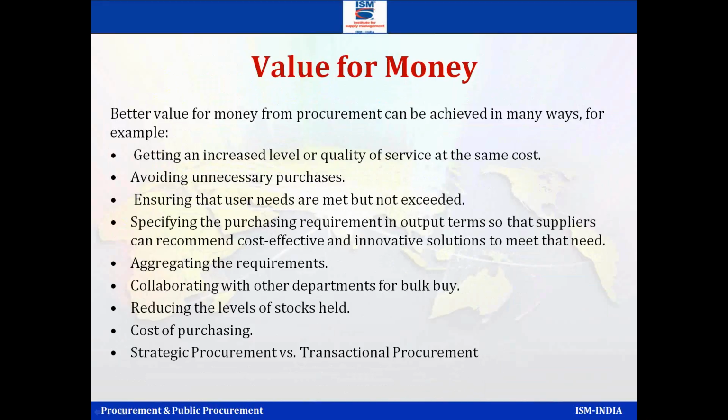But strategic is different. In the US, strategic has been a must from the year 2005. There was even a president's circular on that. Strategic means you try to see what we bought last year, and how much my volume was. Based on the volume, you say these are my high value items, these are my critical items, these are my low value items, these are my leverage items. We use what is called a 2x2 matrix. We call it the spend management part. It's a classic model.